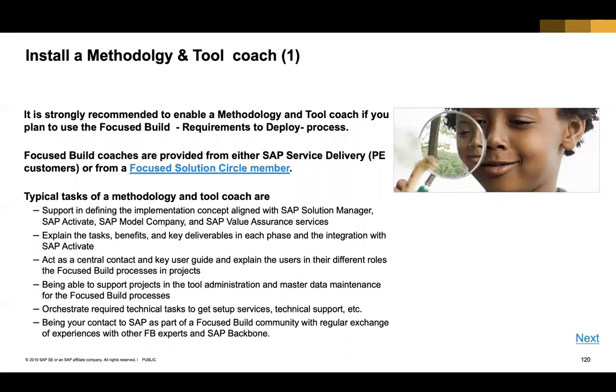Another important thing is to have a dedicated role within the project to help with Focus Build, because as you can imagine, Focus Build is quite interlinked. There are a lot of interlinkages between different entities within Focus Build. Everybody has to use it correctly. Training might need to be done, and so on. For all of this, a PMO-type role is required, what we call the methodology and tools coach.